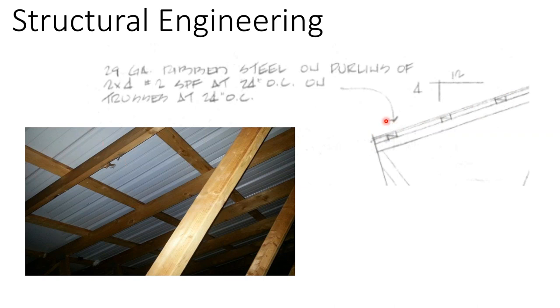And so I was like, well, can you just go up into your attic and snap a photo? And what I have found is that the site evaluation is really just walking around the job site, snapping detailed photos of how the roof attaches to the rafters, how the rafters attach to the walls, what the electric service looks like, what the heavy duty appliances are, and what the electric bill is. None of that stuff is essential for being on site, as long as you have a client who's willing to walk around with their camera and take pictures.